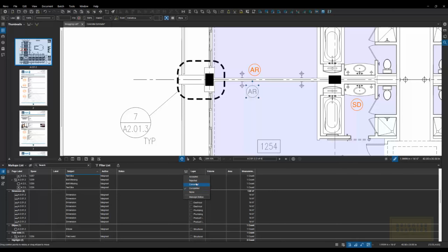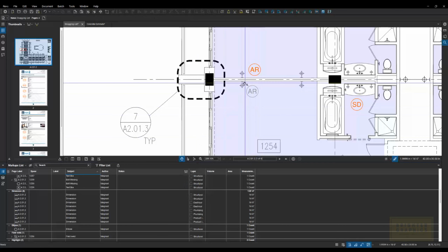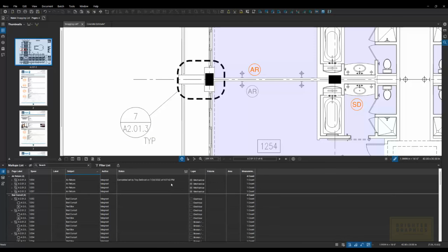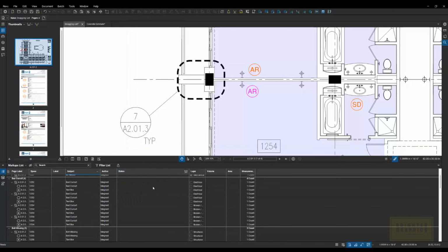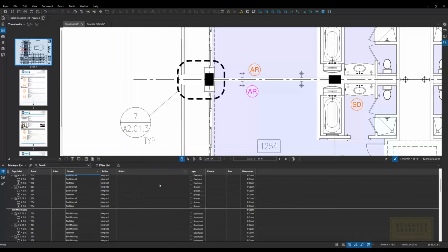You can set up color systems. So for me, I set this up so that when I marked things complete, it would actually gray it out so that it's not drawing attention anymore. It's not orange telling me I need to fix that. And then as a general contractor, I can come through when I see that this was marked complete. I can come in and reject it and so on and so forth. You can see all the different phases of what's happening in that status. So when I rejected it, I asked this one to turn pink to draw more attention. So you can do different statuses like that.